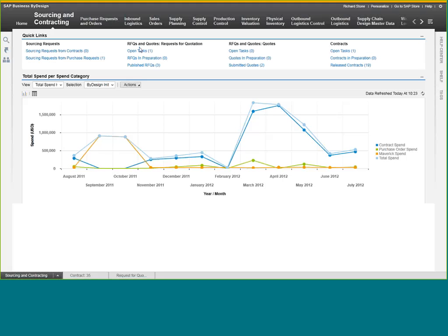And then in the process we're going to go through, we're going to award a purchase order. So as a result of, in our case, the best price received back from that RFQ, we are going to create a purchase order for that quantity for that particular item. We can also create RFQs that we can send out for contracts. So for longer term than just a single purchase order, maybe a contract for a year for a particular target quantity, and then we can call purchase orders off against that. So we'll talk a little bit about that difference, and then we'll see a contract as well.